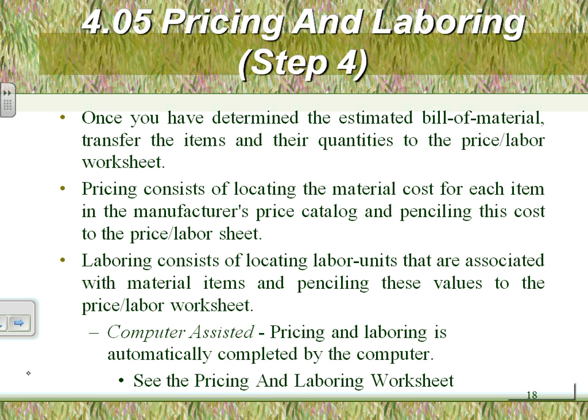If you look at page 60, pricing and laboring sheet 1 of 4. Can you look at pages 60 and 61? There are 2 pages. Can you see how they assign a cost? For example, box 4x4 Mitchell, $59 for every 100 of them, C. And the labor is $18 for C. What's the C?